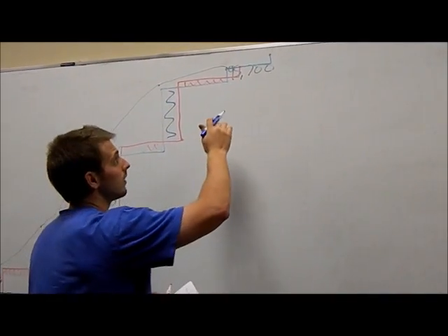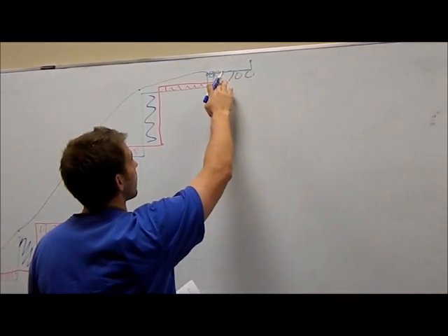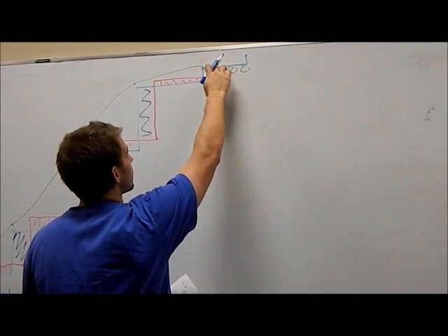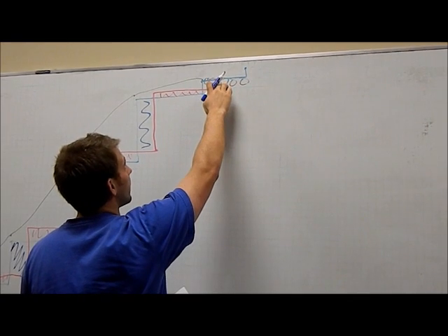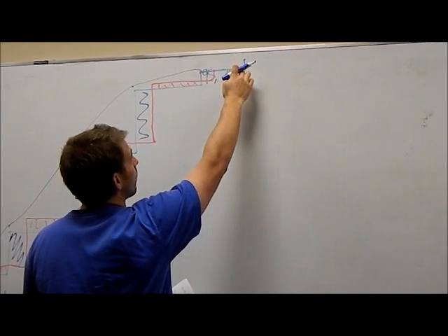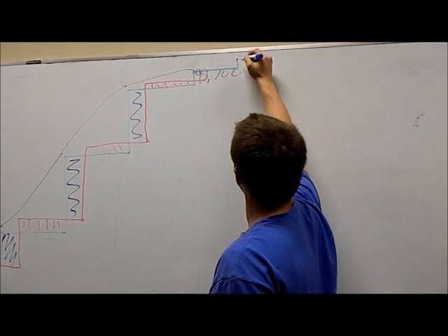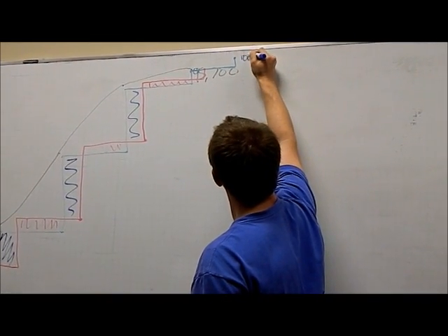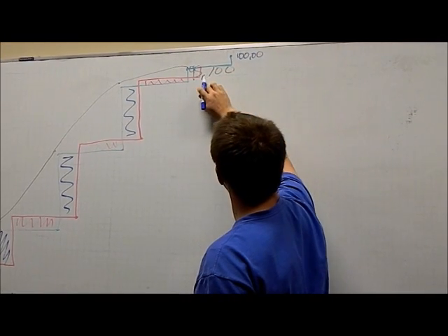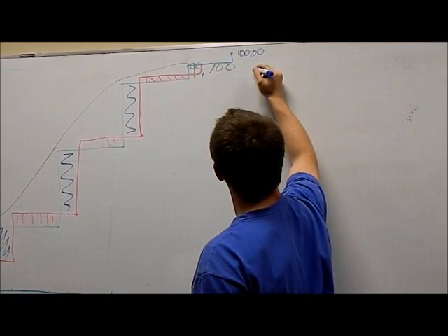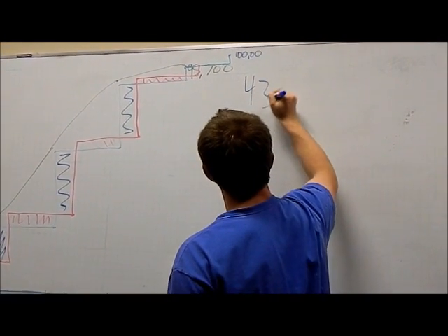Until you get to the end, where paid out equals expenditures, subs are paid up, and we bill for the final retainage of the job, and that's where we get our profit from. The total project cost, $100,000. Total expenditures, $95,700, leaving a profit of $4,300.